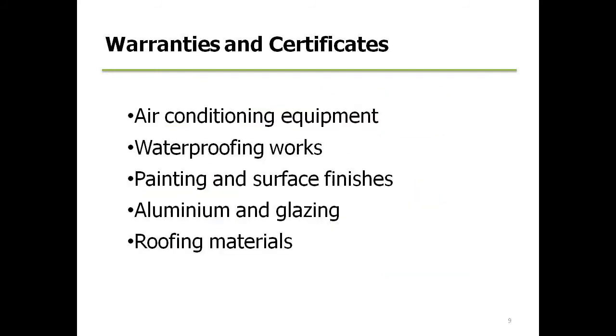So part of the information that needs to be handed over is the warranties and certificates, and these are extremely important in the short term for the builder, definitely, because if he has to return to a project for waterproofing which has failed, and the certification isn't in place and the paperwork not there, well then he's going to have to meet the cost to rectify, and that can be quite extensive in some cases.